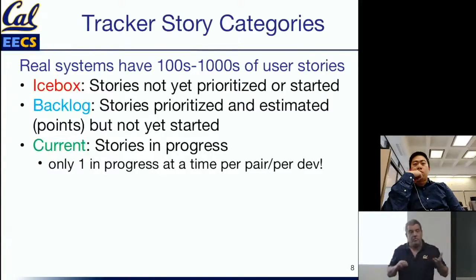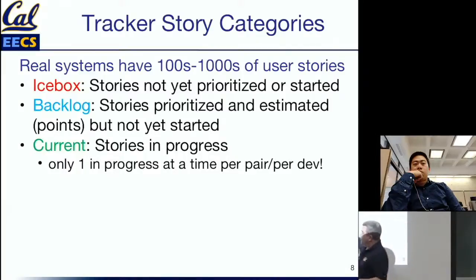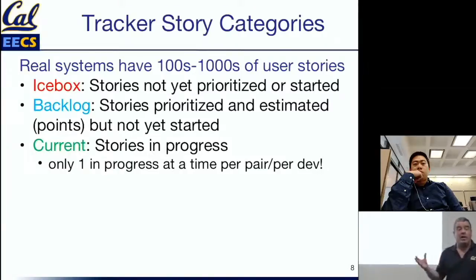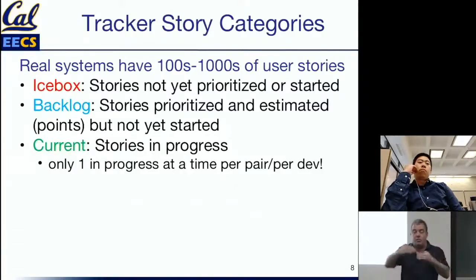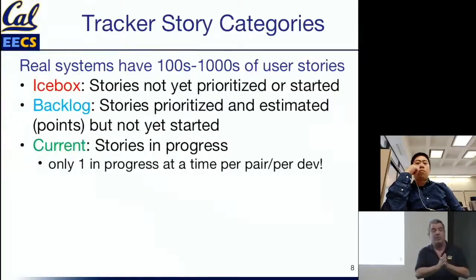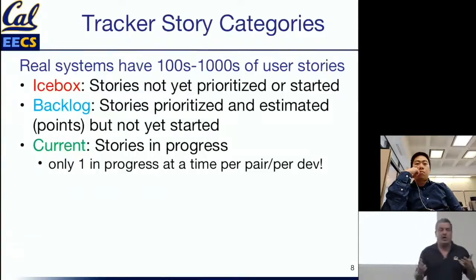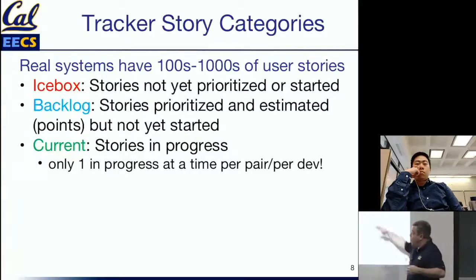So it might happen that you'll have more than one story open, but in general, you'll find that your code base is easier to manage and your work is easier to track if you try to keep the rule of thumb, remembering that in a team of 6, if there are 3 pairs, that means there are 3 stories open at any given time. That means you're going to have 3 different pieces of work that have to be cleanly merged into the master. When you're working on something just by yourself, having multiple things open is not a big deal. But when there's a whole bunch of other people on your team and everybody is working on stuff, the more total stories are open, the pain of trying to merge stuff grows like the square of that, right? And the likelihood that you'll have a merge conflict and want to throw something at somebody.